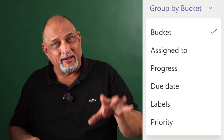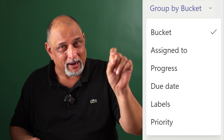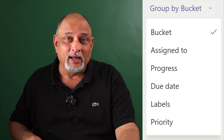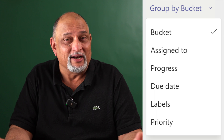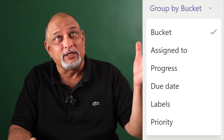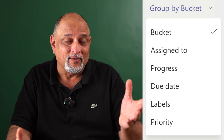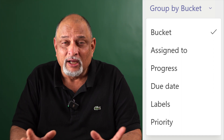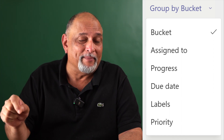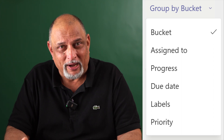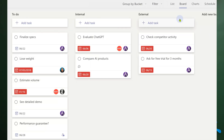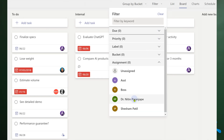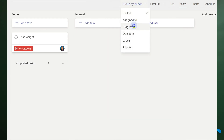You can also group. By default it is grouped by bucket, but very often in a review meeting you want to see what's started, what's not done, what's yet to be done, what's finished. Don't do that manually — just go to Group by Progress. That's your Kanban view. No need to manually copy, paste, or regroup. Look at different filter and group options and depending on the context, choose the right one. For example, if you want to see your own tasks, just filter on your name and group by progress.